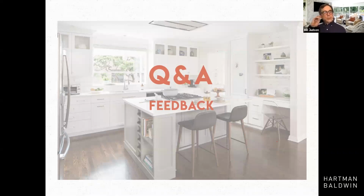I'll mention too, for us, that's always done on an individual basis. Each step of the process, I talked about how we get to doing a design proposal for the conceptual design. So before we start that piece, you know exactly what that's going to cost. Likewise, before we start the design development process, we give you a fixed fee for that. So you know exactly what that piece of the process is going to cost. And then we talk about the cost of construction, and I mentioned how we get to the guaranteed price on the construction before we start that. So we're very big on making sure that each step of the way, you know what you're going to get and exactly what it's going to cost. No open-ended agreements with us.